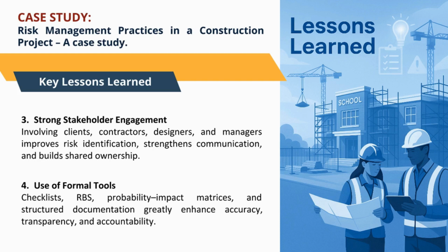The case study also demonstrates the value of using formal tools and techniques. Structured methods such as checklists, risk breakdown structures, probability impact matrices, and standardized documentation significantly enhance accuracy and transparency. These tools reduce subjectivity, support consistent evaluations, and strengthen accountability across the project team.